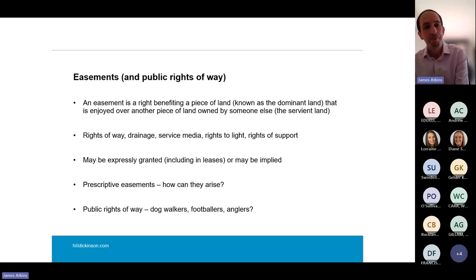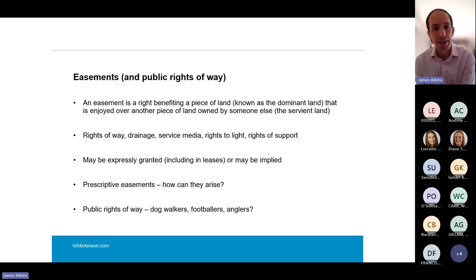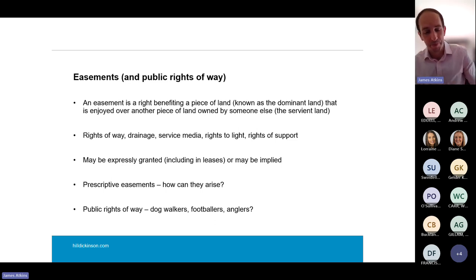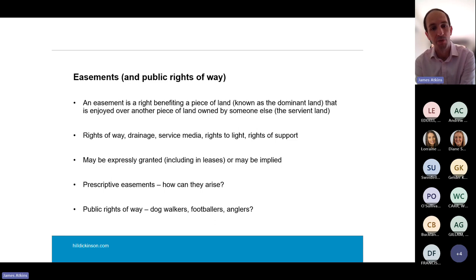Next, easements. An easement is a right that benefits one piece of land over another. Here we're talking about an easement over the trust's land. Easements can be either expressly granted or implied. An expressly granted easement should be recorded at the land registry. Using software, you can check very easily whether there are registered easements — rights of way, drainage, services, rights of light, support — things that might be registered over the trust's land. There's no point planning a development that's going to infringe rights that your neighbour is enjoying over your site.